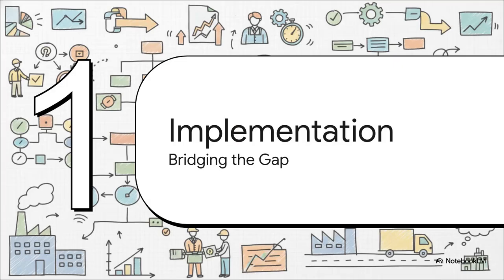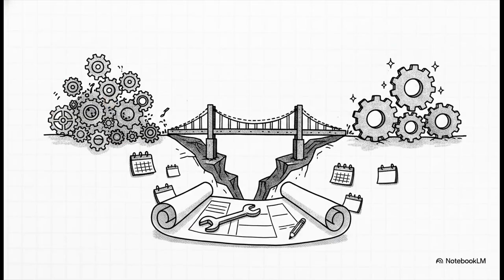Section 4. Preparing for implementation, bridging the gap. Okay, having a gorgeous, optimized map drawn up on a whiteboard is completely useless if we can't translate it into operational reality. This is where your yearly value stream plan steps up. It is your actionable, strategic blueprint. It takes the theory of the future state map and converts it into real-world, scheduled improvements. It spells out exactly what needs to be done, when it happens, and exactly who owns it. It is literally the bridge between how clunky your teams function today and how seamlessly they're going to flow tomorrow.